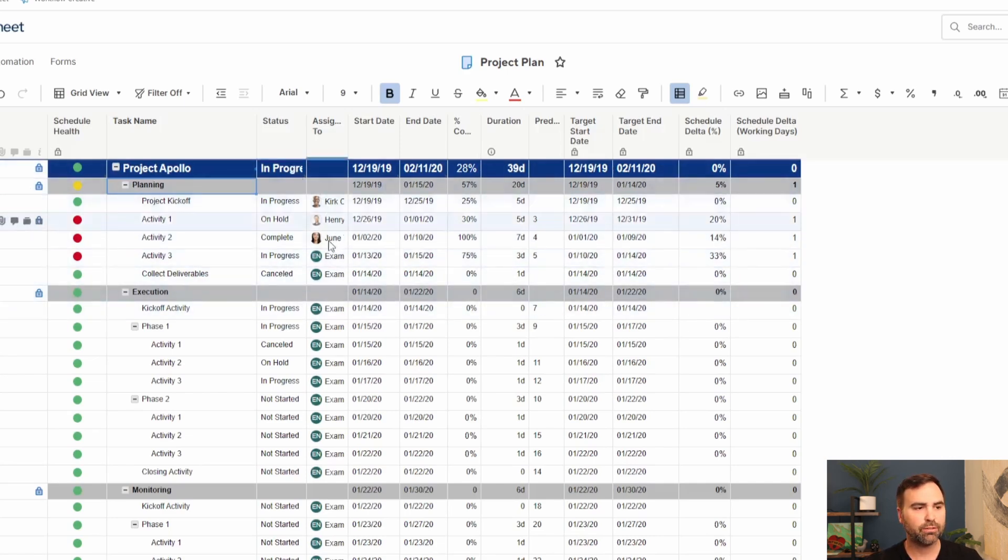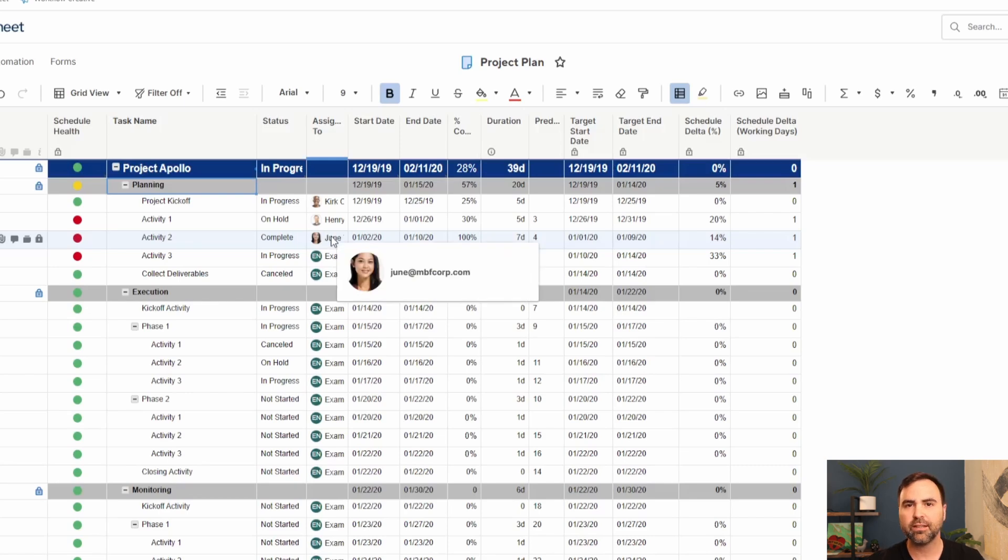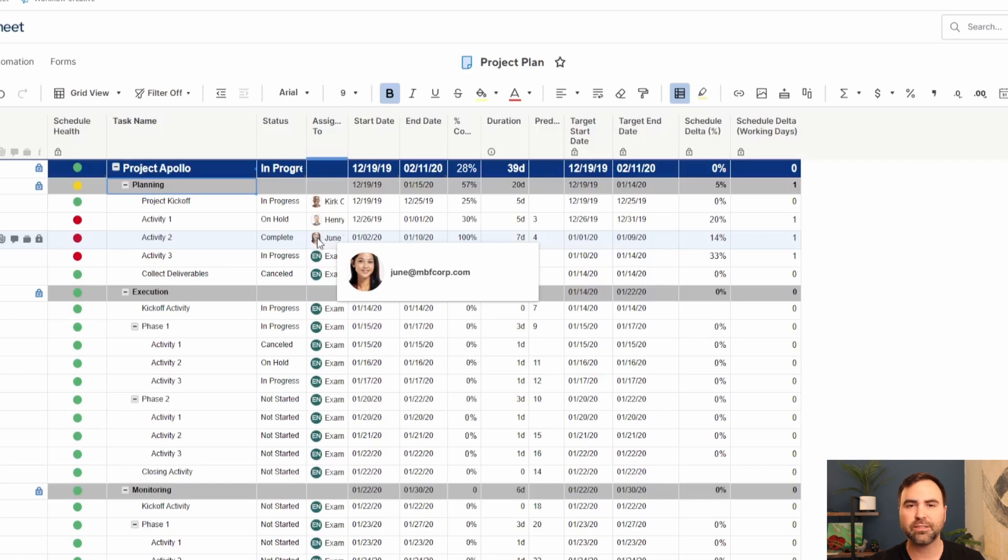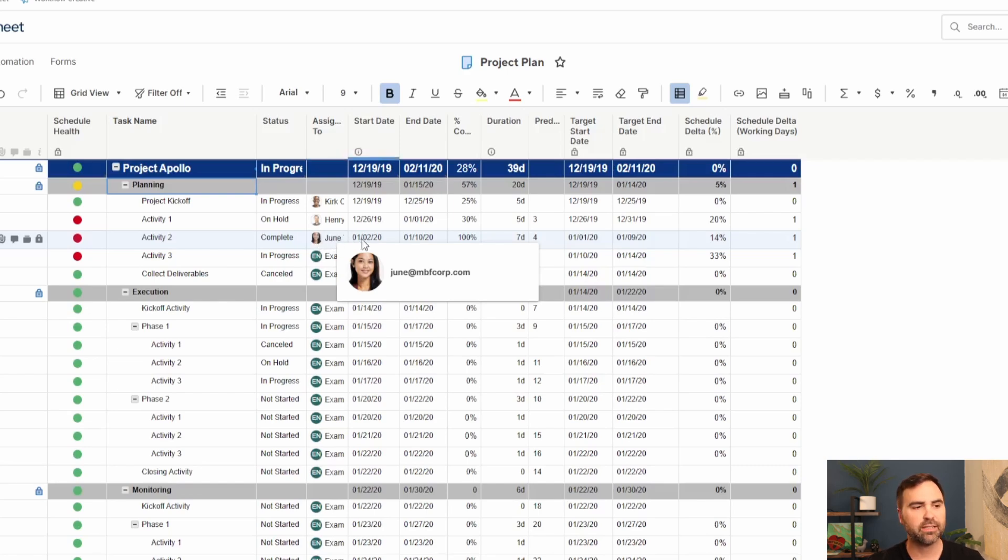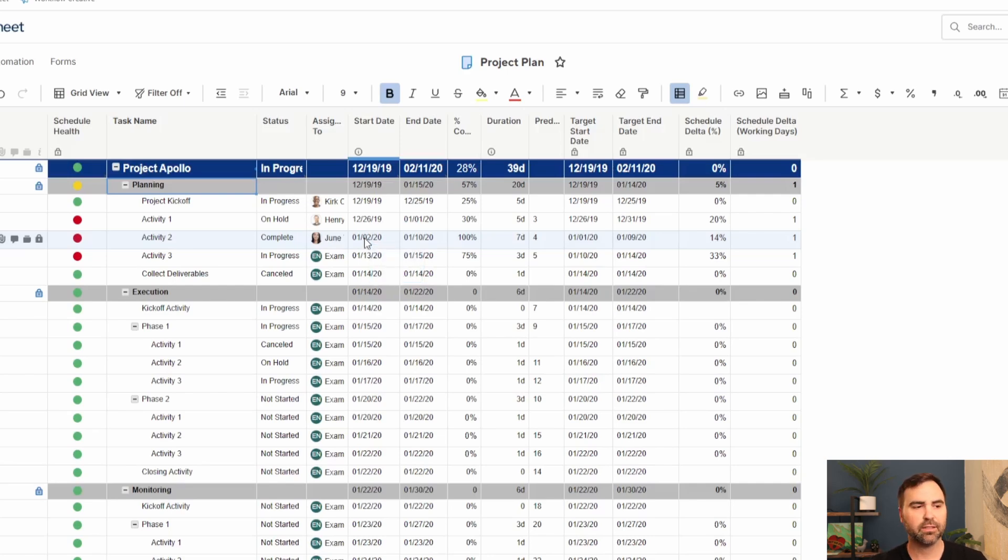We have an assigned to field here to indicate who this task is assigned to, which we can then automate and send off automations for as well. I can send June an automation that says when her task is going to start seven days prior, she'll get an automation reminding her that this task is going to start. We can send the same types of automations alerts for any overdue tasks and then various other scenarios as well.